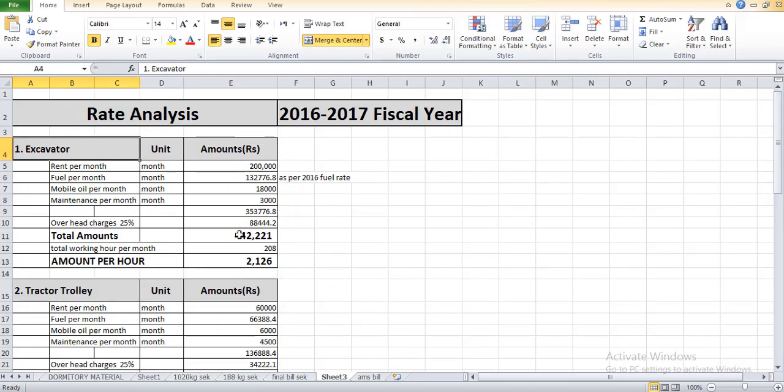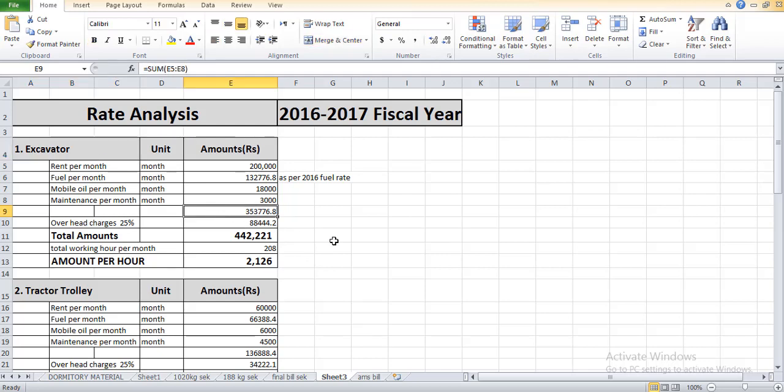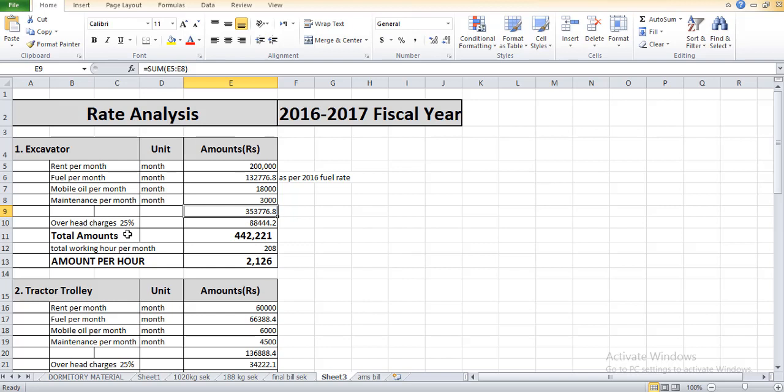As you know, the capital cost of excavator is very high, so small contractors cannot purchase it. When the quantity of work is low, if our project is long-term with a lot of excavation works, shifting soils and other material for dumping or fillings, we need excavator. That's why to avoid the problem of daily monitoring, we hire it on monthly basis.